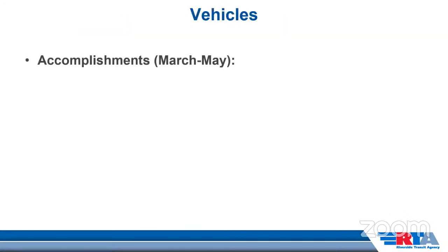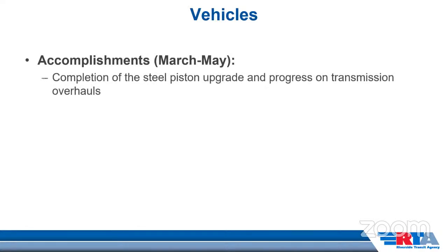Looking at vehicles accomplishments over the spring, substantial completion of the steel piston upgrade project and progress on the transmission overhauls. These were two separate projects that were greenlit by the board back in early 2021. The final steel piston upgrade, I believe, is taking place as we speak. Once that is complete, all 145 Gillig buses will have swapped out the aluminum pistons for the sturdier steel. The transmission overhaul is a little bit more of a longer process.